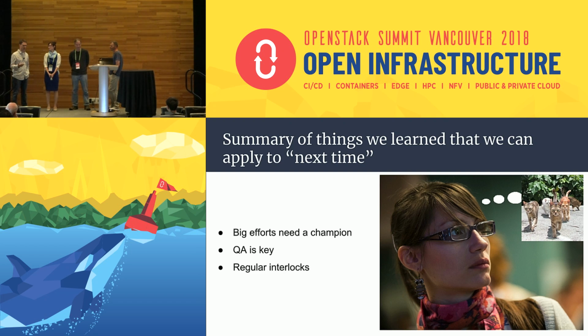The other thing is integration testing. QA is definitely key, and doing it as early as possible is key. The shared targets issue that they were talking about earlier came up simply because we wrote a Tempest test to just try this multi-attach thing, which the default testing upstream is just on a single host. So we would attach the thing twice, detach one, detach the other, and it would explode. And that was this shared targets issue. So by writing a simple test just for how the API works, and writing it early enough, we found out, oh, we've got this major issue that we have to solve.